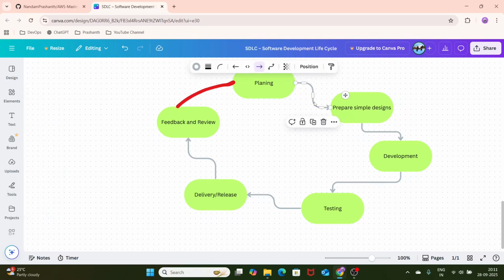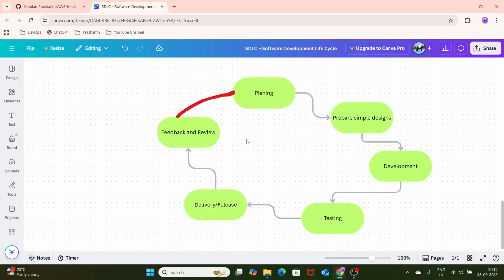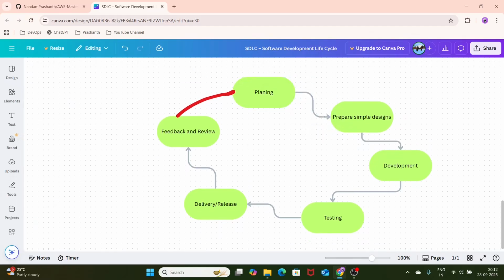As I said, we'll be having multiple sprints. We will choose the planning and the design, everything, as per our sprints. In the first sprint we'll be delivering a few features, and in the second sprint we'll be delivering a few features, and it goes on. In sprint 1 we can design login and registration of that particular application. And in sprint 2, product search and cart.